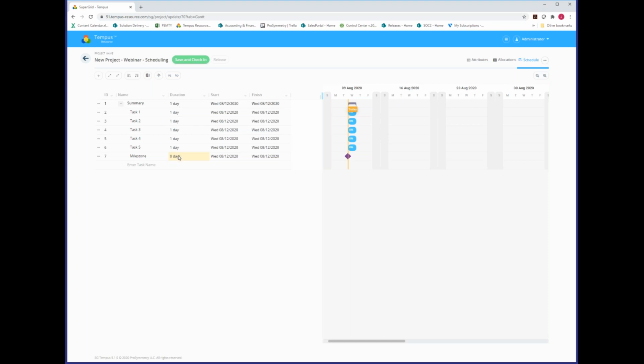All right. Now, the next thing I'd like to show, and it's certainly not the specific sequence you have to take. You can follow really whatever sequencing you'd like. But I do want to show how you would update durations. Now, we haven't assigned any resources yet. We're going to really make this more of a duration-driven planning interface or schedule. You can certainly change it to be driven by units of allocation, by work, or by duration. If you're familiar with the concept of a task type, in terms of how the task is maintained, how the calculation is performed against duration, work, and percentage allocation, there's a triangle that's usually displayed for explaining how that functions, where one side is fixed, another is changed, and the third is auto-calculated. That's driven by a field called task type.